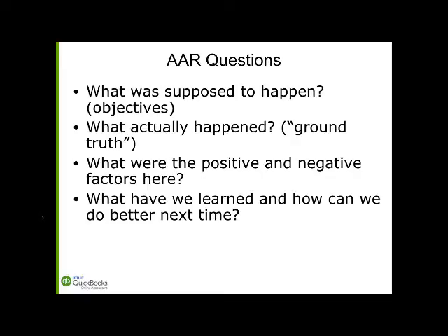And firms that have been doing after-action reviews, after a year or so, they start doing them with the customer. Imagine sitting down with your customer and going through these questions. One of the things the Army has learned by doing after-action reviews is that it's really good at clarifying those assumptions up front. Because the Army has learned that it's usually cloudy assumptions that screw up an engagement more than anything else.